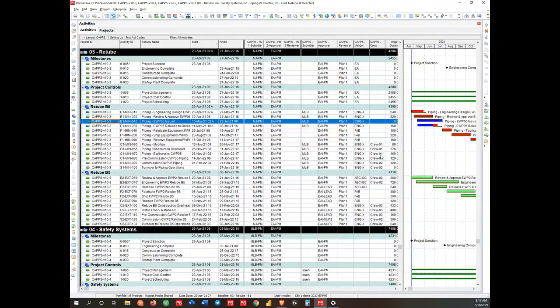And I can get even deeper into the way I divvy it up. I could have not only my vendor, but also the crew lead. Okay. So very much up to you how you want to deploy it. Completely configurable in terms of the layer of detail and who you give which activities to for the updating. So very simple in terms of the setup. And then we take advantage of that coding to give to the different users the login and which set of activities they're going to have access to.